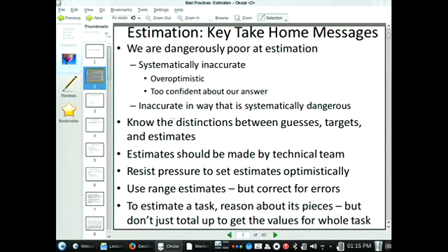People, software developers, tend to have very poor capacity to estimate closely how long certain tasks will take. What's worse is we're not only inaccurate, we're inaccurate in ways that put ourselves systematically at a worse disadvantage. Instead of overestimating, which has some costs associated with it but is not nearly as damaging, we tend to underestimate how long things take.